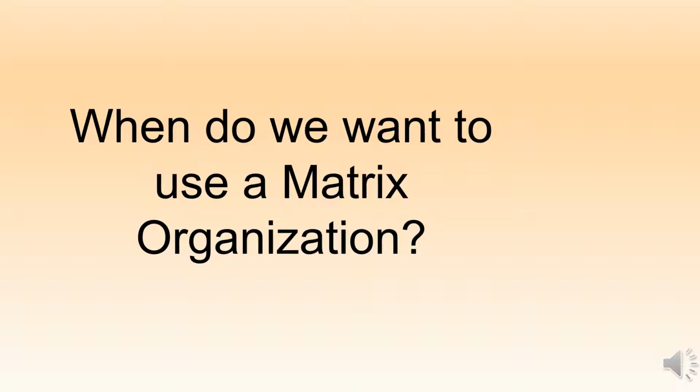When do we need to use a matrix organization? Matrix organization structures are best for large projects. It's also great for organizations that already have established functional groups, teams, or management structures, because the matrix organization allows projects to respond quickly to changing needs without disrupting existing organizational structures.